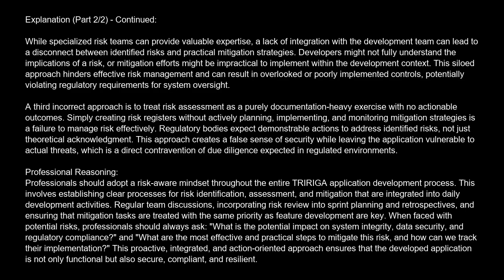A third incorrect approach is to treat risk assessment as a purely documentation-heavy exercise with no actionable outcomes. Simply creating risk registers without actively planning, implementing, and monitoring mitigation strategies is a failure to manage risk effectively. Regulatory bodies expect demonstrable actions to address identified risks, not just theoretical acknowledgement. This approach creates a false sense of security while leaving the application vulnerable to actual threats, which is a direct contravention of due diligence expected in regulated environments.